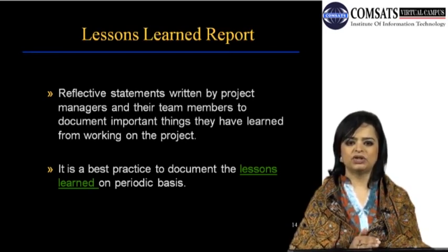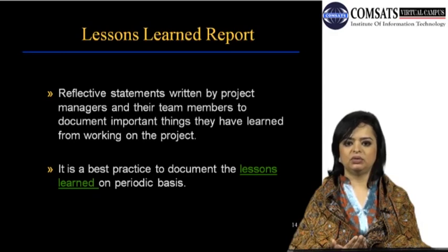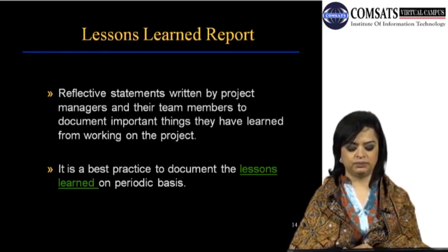And the reason that the project manager should not be facilitating this meeting is because he or she cannot appropriately share or discuss some of the issues that did not go very well. So the project manager should just be a participant along with the other team members, and a facilitator should be out there to nudge people into obtaining the right kind of information.